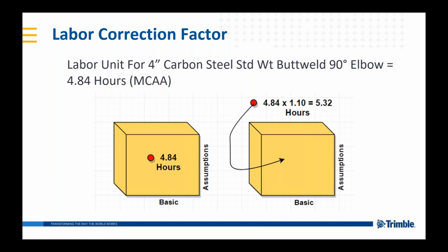If the condition applies to the entire project, apply that factor at the end of your estimate in the closeout sheets. But if the condition applies to only a certain portion of the estimate, apply it at the line item detail during your takeoff. Or in other words, doing your takeoff when the condition exists.